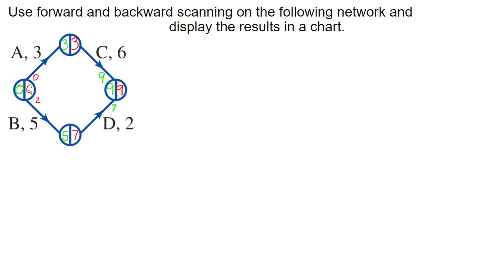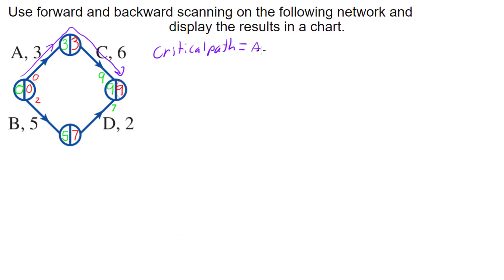When paths separate at a node going backwards, we take the smallest value — that represents the latest start time overall for leaving that node. The latest I can start from this node is minute zero, so I cannot delay A at all — that identifies my critical path. I can still wait a little for B though. The critical path is the one with no delays, where all the numbers match up: zero, zero, three, three, nine, nine. So the critical path goes through A and C. I have two minutes spare along the B and D path.